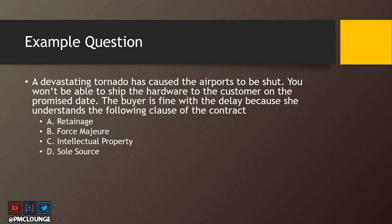Here's a sample question: a devastating tornado has caused the airports to be shut down — you won't be able to ship the hardware to the customer on the promised date. The buyer is fine with the delay because she understands a specific clause of the contract. The answer is force majeure. Other options include written age, intellectual property, and sole source — this is the kind of question that may show up in your PMP exam.